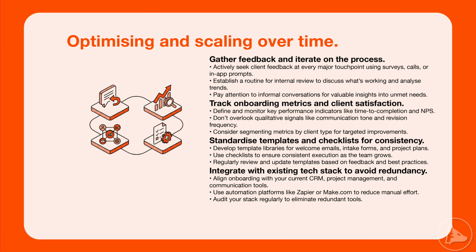Track onboarding metrics and satisfaction. Track simple metrics. Time to complete onboarding. Intake completion rate. Number of support questions during onboarding. Time from signature to kickoff. Time to first deliverable. Combine that with satisfaction checks. A quick post-onboarding survey works. If you want to go deeper, segment by client type or project size, because different clients have different friction points.